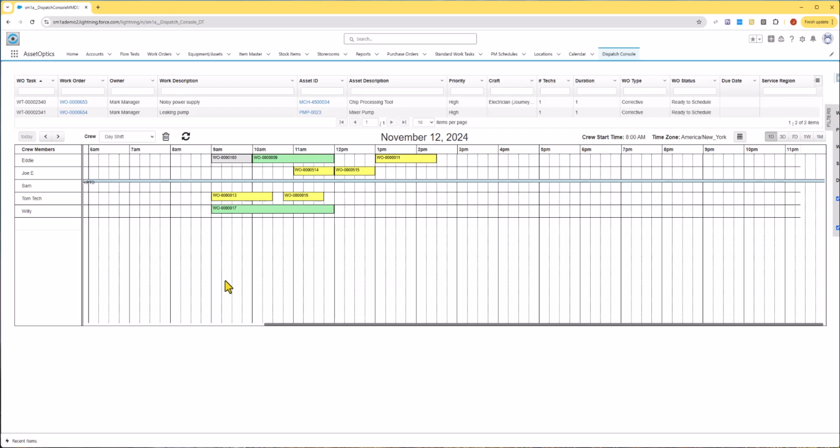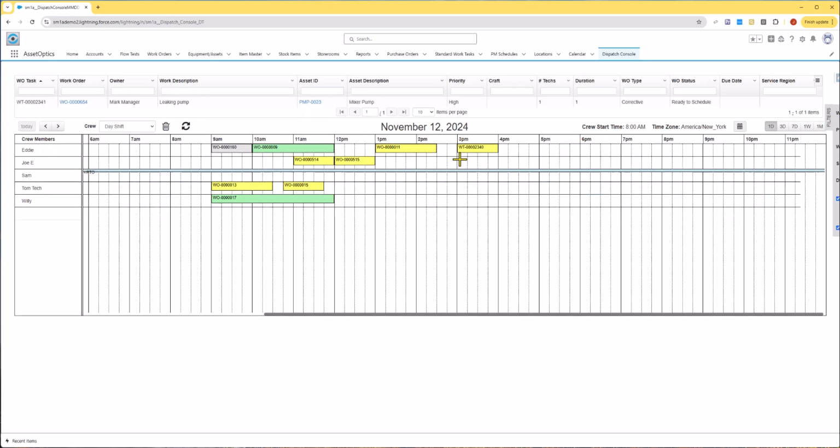You'll also note that there are different colors associated with these work assignments. You'll get comfortable and familiar with those the more you use it. There are about 4 different statuses, or a combination of statuses on the work assignment, which will be reflected by the colors here, whether it's the current assignment and whether it's started or completed. Mostly you're going to see yellow. These are for new work assignments, as in I just created a work assignment for a user by dragging it onto his timeline. The green one, though, is started. This is one that he's actually working on right now.